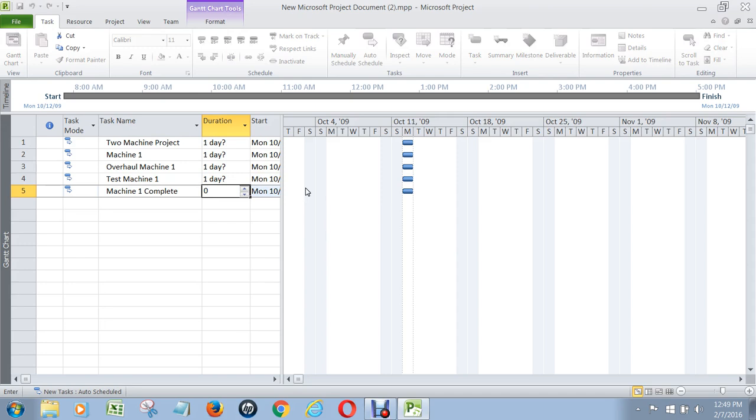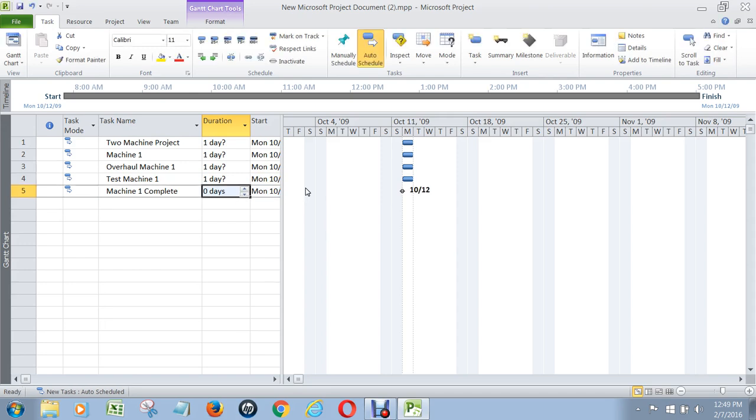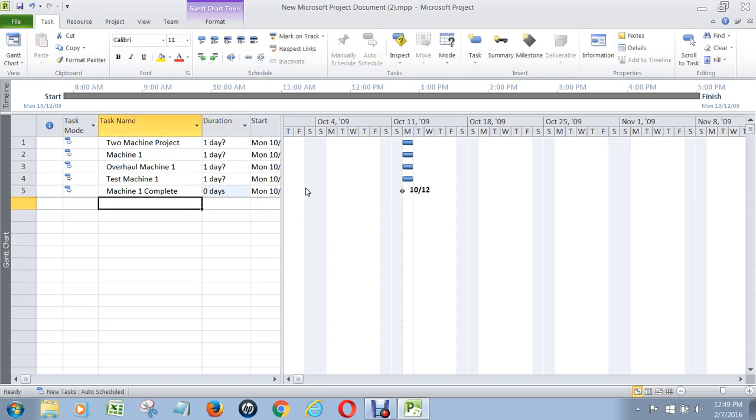Now, milestones have zero duration, so I'm going to put that in there. These durations will update later on.